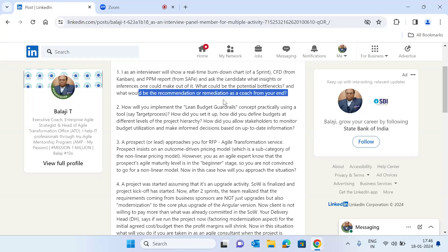In terms of remaining work, we need to look at the slope of the burndown line. The slope shows the rate at which work is getting completed. If it is a flat slope, it indicates slower progress. Depending on the slope, you can tell whether teams are making rapid progress or slower progress.